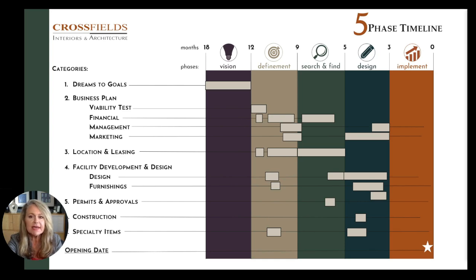We say secured the space because now you know the money and you know the space, and you can start the design. Your activities should now include executing your business plan, marketing and management, and hiring. And it should be immediately, because as I said, that's one of the mistakes people make. The design phase typically lasts about 4 months, and it includes both design and the permit process. These timelines are based on a white box experience. Lastly is the implement phase.